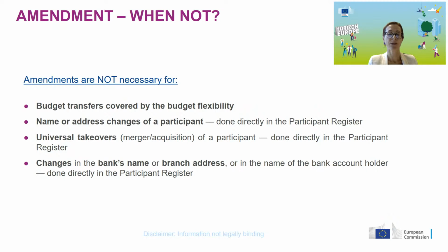One big limit to budget flexibility is that you cannot increase the maximum grant amount, and this you cannot do either with an amendment. You cannot increase the maximum grant amount.